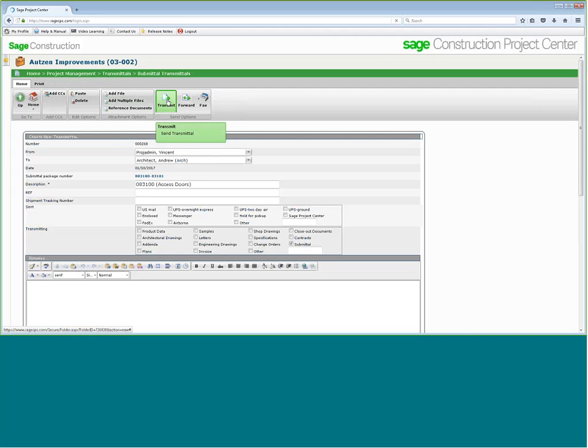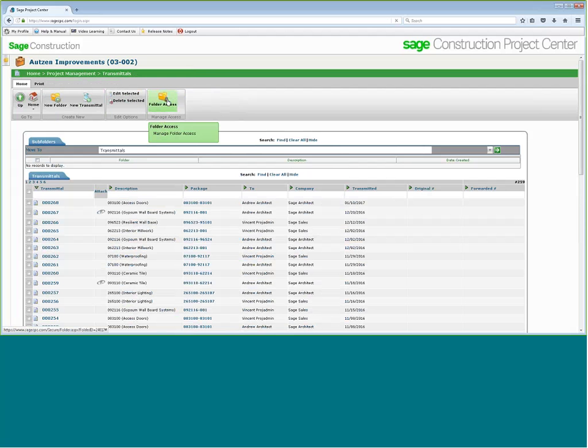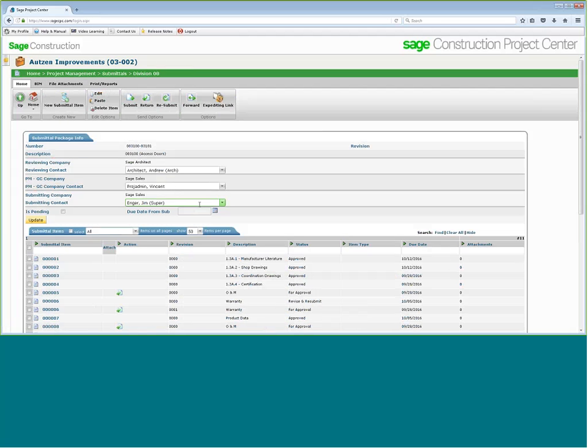And we have fully customizable approval processes, meaning if you would like to have your subcontractors create their submittals and forward them to you, you can forward them to the architect and back down, we can do that. We can do just you to the architect. We can even have your subcontractors collaborate with you on a specific submittal. It's all doable. We've got, in most cases, 3 to 4 main ways you can do it, depending upon your company. So take my examples here with a little bit of brain thinking on, hey, this is what Vincent's doing, but I could do it a little bit differently because the tools exist.